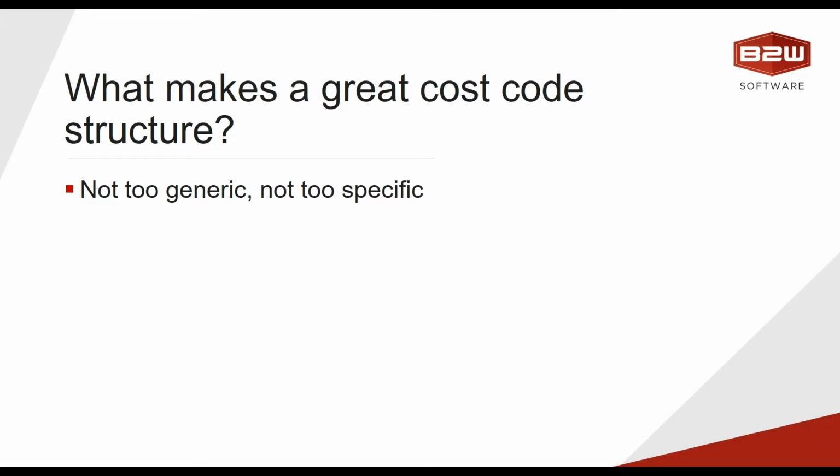There's a temptation, when there's all this information that you realize you could potentially gather, to make a cost code for every one of those things that it might be interesting to know. That leads to problems in terms of the logistics of the field actually reporting on it, accounting having to correct those things along the way, and sometimes it's just too much for an initial rollout.